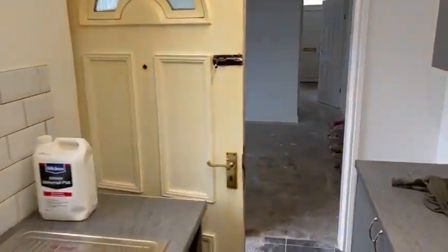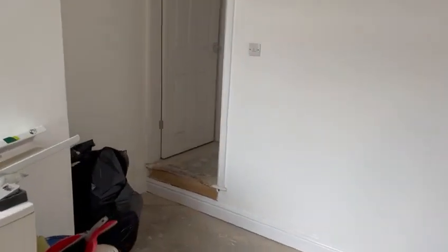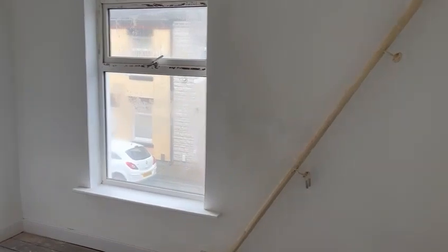The new back door and the new window, they're on site at the builder's yard. They're gonna be going in early next week. And the carpet is booked for the 12th of April. About a 2 week lead time on the carpet.